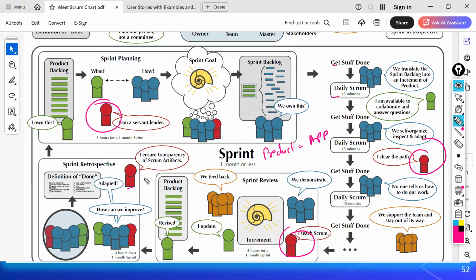Yeah, like that's what. Retrospectively, if you have a pretty competitive environment and they're moving super fast, they might cut down this retrospective meeting to a few minutes call as well, if they feel that everything is going fine. Because in the retrospective we don't have any client involvement. It is internal to the team, right?